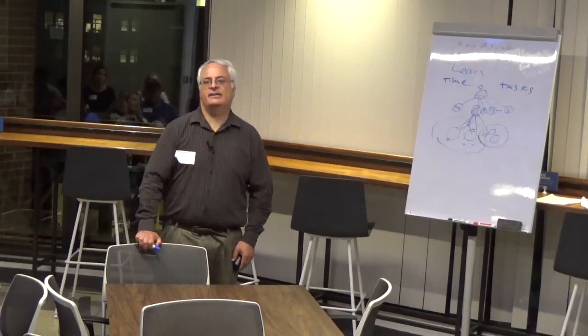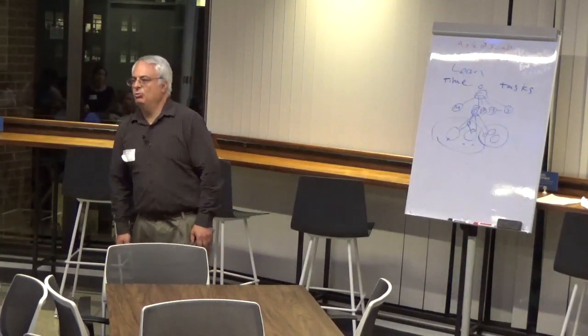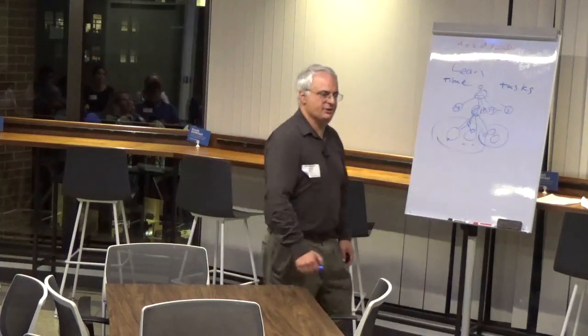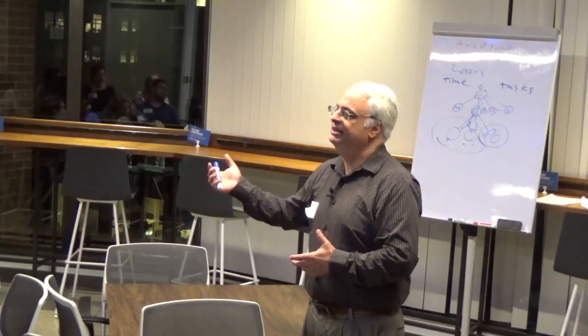I mean, in fact, one of the people I've worked with a lot, Joanne Rothman, who's written a lot of books on the topic of product management, argues get rid of story points. She says, look, everyone always converts that into hours anyways, right? And companies that have story points usually have some kind of conversion in their mind, whether they use them or not. So she says, why are we even doing something abstract to get to the concrete?